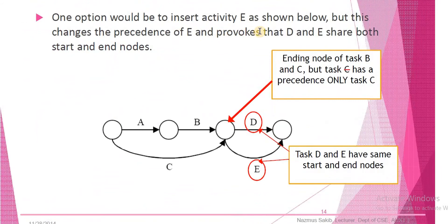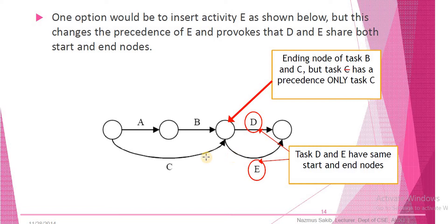One option would be to insert activity E as shown, but this changes the precedence of E and causes D and E to share both start and end nodes. The join node is shared, and E's starting point keeps the same starting point as D. Since D and E are the same in start and end, a conflict will arise.